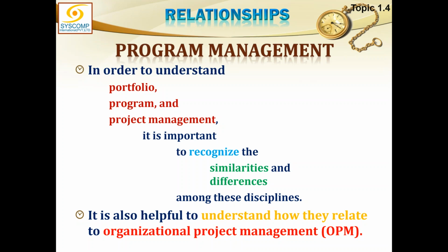And organizational enablers, what are they? They are exactly the same thing we were talking about: cultural, socio-economic, and all those factors, which we used to call enterprise environmental factors. But at a very high level, they are no longer called enterprise environmental factors. At the OPM level, they become organizational enablers. So portfolio management, program management, project management, and organizational enablers, these four things put together are called organizational project management.